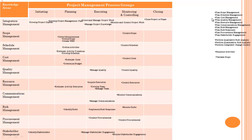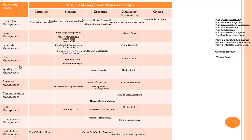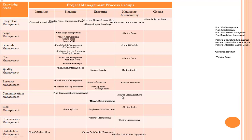Plan scope management — remember, all plans will come under process group planning. Plan scope means it will come under process group planning and knowledge area scope management. Same way: plan schedule management, plan cost management, plan quality management, plan resource management, and plan communication management all come under planning process group in their respective knowledge areas.